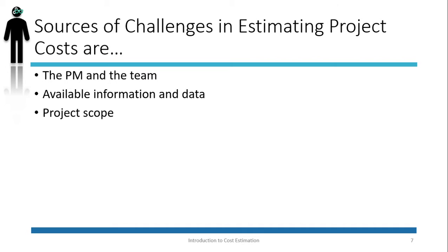The other source is project scope. If the project scope is not very well or completely defined, estimating activity costs will become difficult and less accurate. Unfortunately, in many cases, lack of clarity in the project scope might be unknown to the PM and might remain unknown for quite some time. The PM may feel that the scope is clear. As a result, the PM would confidently estimate the costs based on the information available at the time. The problem is that the PM's confidence on the estimating and estimated numbers has little to no relationship with the accuracy of the estimated numbers.